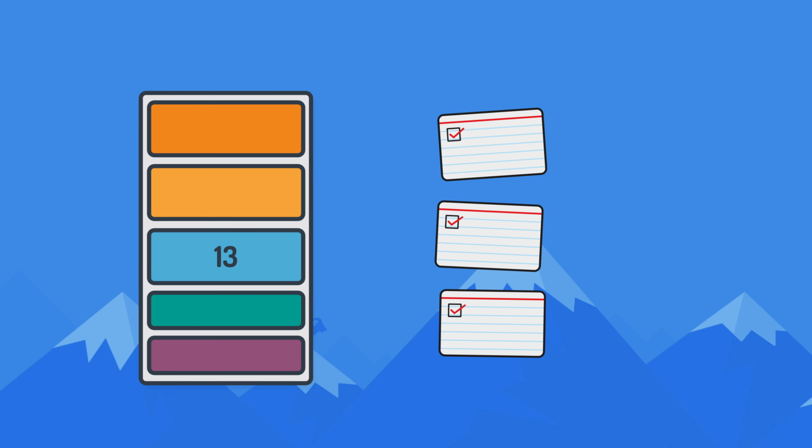Perhaps they split it into 3 smaller stories, which they estimate as 5, 5, and 2 points. Notice what happened there with the numbers? The 3 small stories add up to 12 points. That's one less than the 13-point estimate you actually put on the larger story. But it's 2 more than the 10 you really thought was the right estimate for the initial large story.